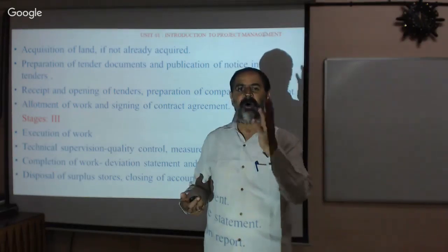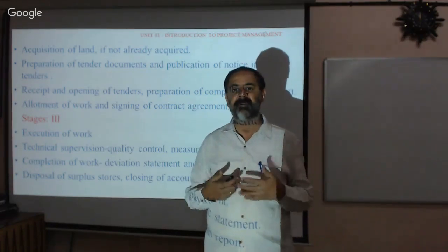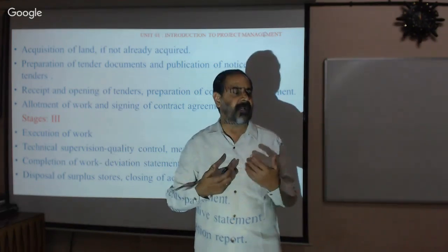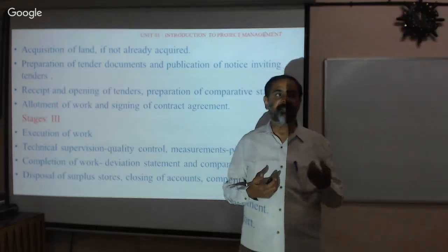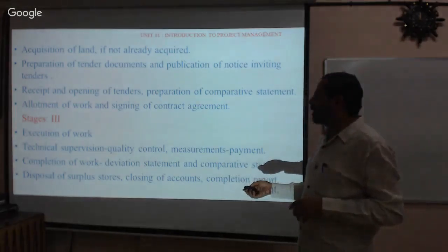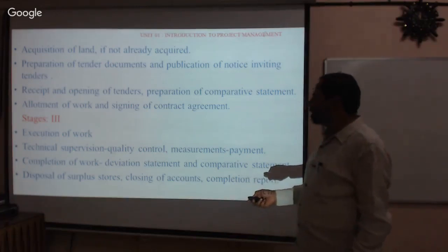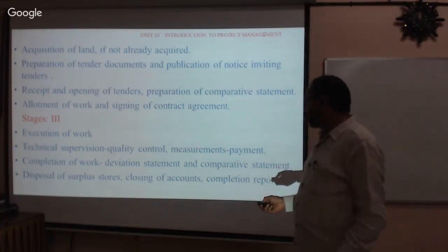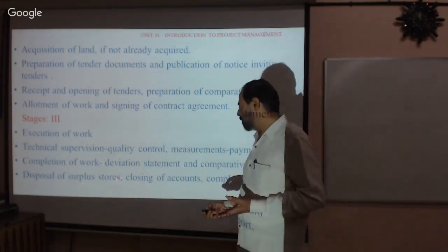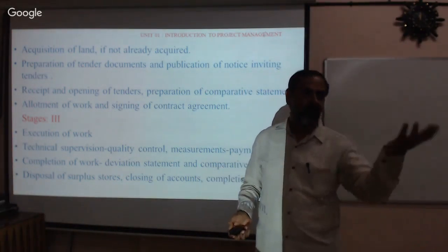In-house you have computers, and you have people with you in the office. You can prepare whatever data is available. You can prepare the drawing and the estimate, collect the data, and design the elements of your structure. Then the third one, the execution part, is the most important task. Therefore, please note, in the execution part: technical provision, supervision, quality control, measurement, payment, then completion of work, deviation statement, and disposal of surplus stores. These are the various steps to be followed by the manager.